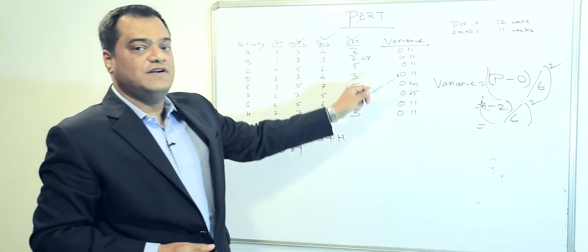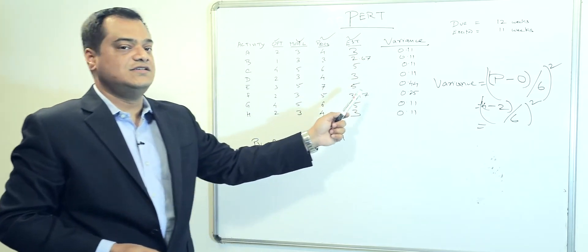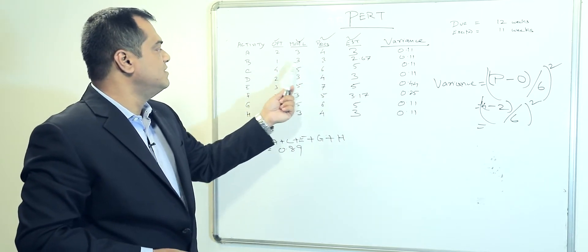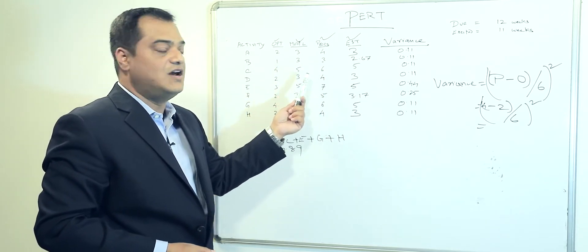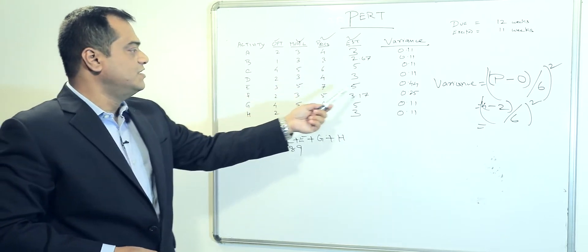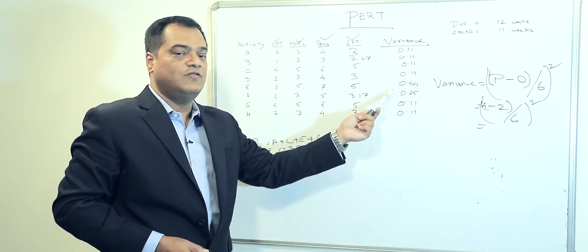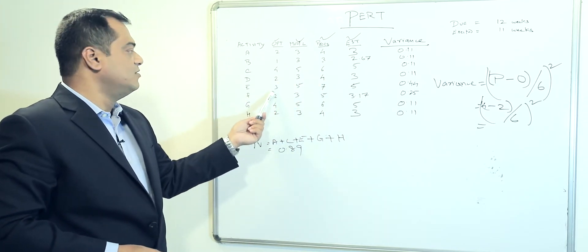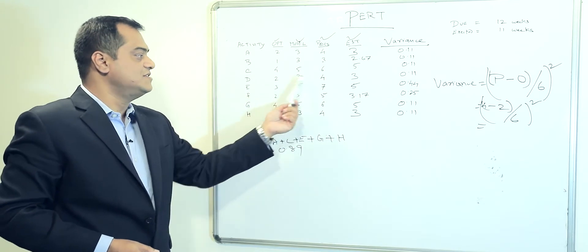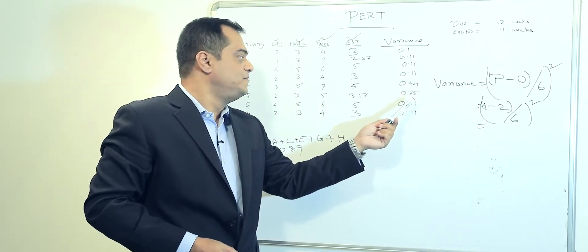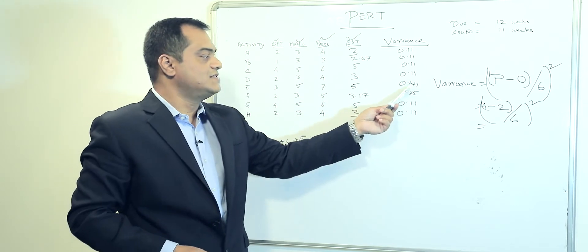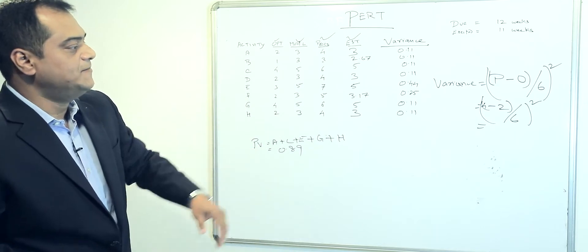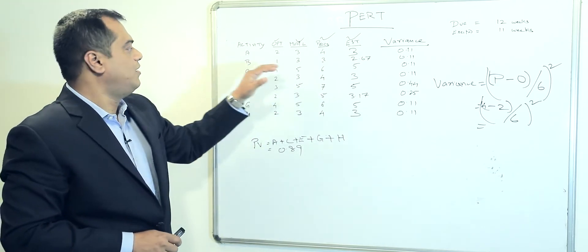We have plotted all the variances. In most cases the variance is quite similar because the difference between optimistic and pessimistic is nearly the same. However, in one particular case we have a variance of 0.44, because the pessimistic number is seven and optimistic is three — a bigger difference means bigger variance. The next largest variance is 0.25.